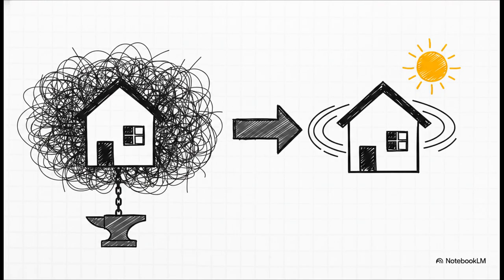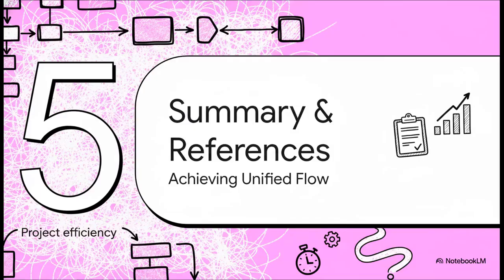And we see similar immense benefits across all different types of builds. In architectural residential building projects, researchers documented up to a 34% reduction in overall project duration. Simultaneously, they saw a 22% increase in actual value-adding time. How? Because VSM actively removes the waiting and transport wastes. That directly shrinks the lead time variable in our math equations, naturally leading to highly streamlined processes and vastly improved resource utilization. Section 5. Summary and References.